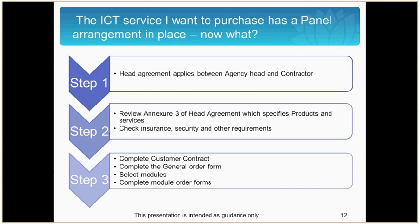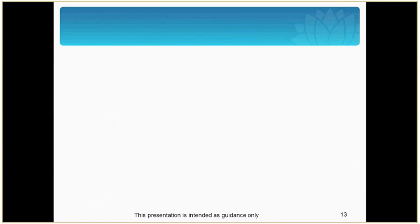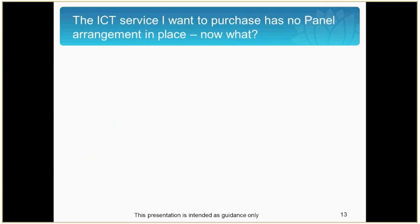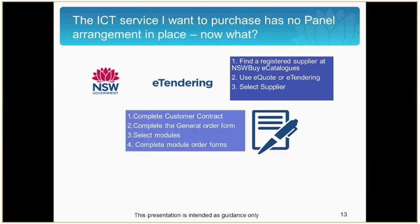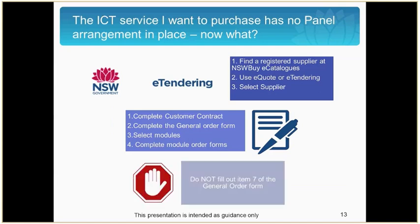Select and complete the modules and module order forms. What if the ICT service that you want to purchase has no panel arrangement in place? If there is no panel arrangement, you need to follow normal procurement processes, finding a registered supplier from Scheme 20, which is the pre-qualification scheme for ICT goods and services, using e-quote or e-tendering to select your preferred supplier. You will then complete the customer contract, general order form, modules and module order forms. Do not fill out item 7 of the general order form as there is no panel arrangement.